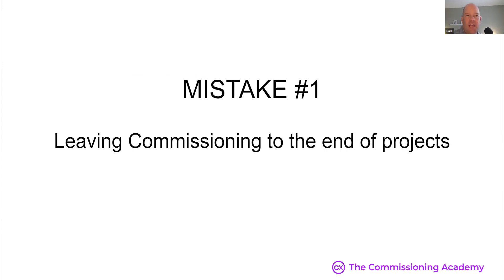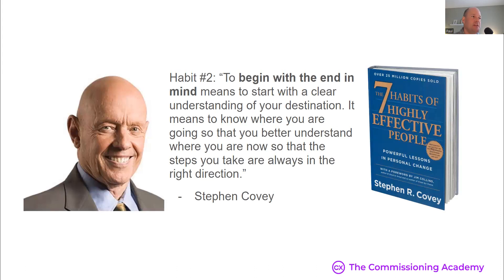The first mistake is leaving commissioning to the end of projects. We've been told that commissioning takes place at the end — you finish construction, everything's installed, then you test at the end. But this is actually not true. When commissioning is left to the end, you have no way to be proactive; all the problems are left at the end with no time to recover. As Stephen Covey says in 'Seven Habits of Highly Effective People,' habit number two: begin with the end in mind. All projects that have ever finished on time and on budget are implementing commissioning project management right at the beginning.